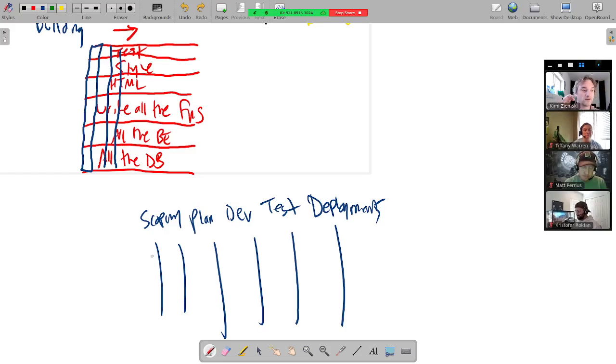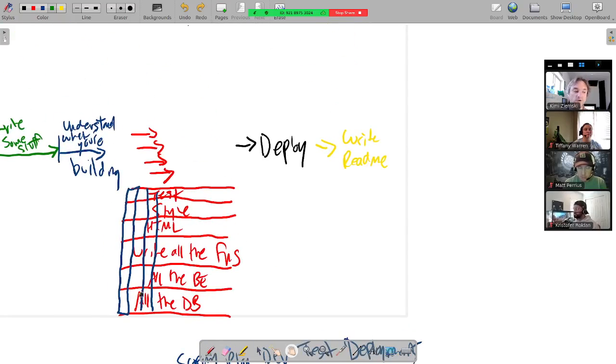Now, a minor distinction I want to make on this: doing these 5 things in order, but just doing it over and over again, that's not agile. It's closer, but agile is all of these things happening all of the time, not in discrete steps. Small distinction to make. But that's what we're trying to do here, is have something that is finished, complete, not done-but. Not, oh, I have everything except the documentation. I have everything except the tests. Like done, 100% for something small.